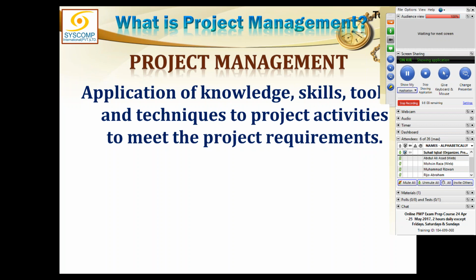So basically, the mere definition of project management tells us that it is to deal with in-scope work of the project. Anything which is out of scope should not be done, because if I do anything which is out of scope, the cost incurred on that, the resources spent on that would be extra burden on the project. So I should only be spending money on the work which is contributing towards the project requirements or the objectives of the project. If something is not contributing towards the ultimate deliverable, that activity should not be part of the project and I should not be applying my knowledge, skills, tools and techniques on that.